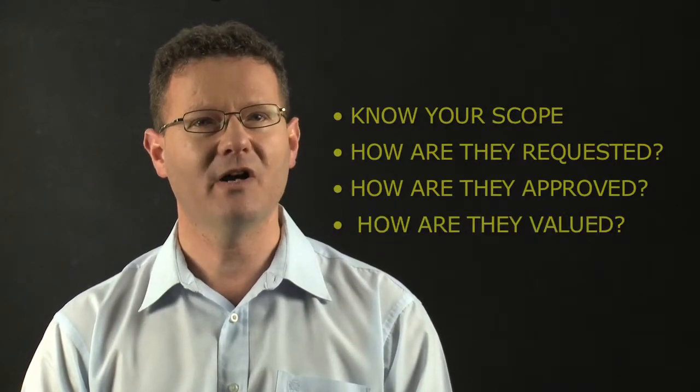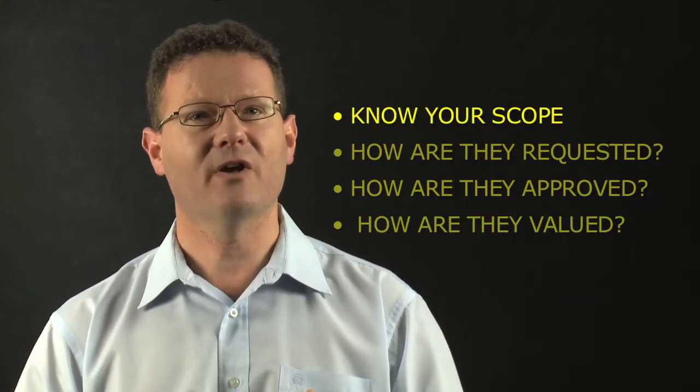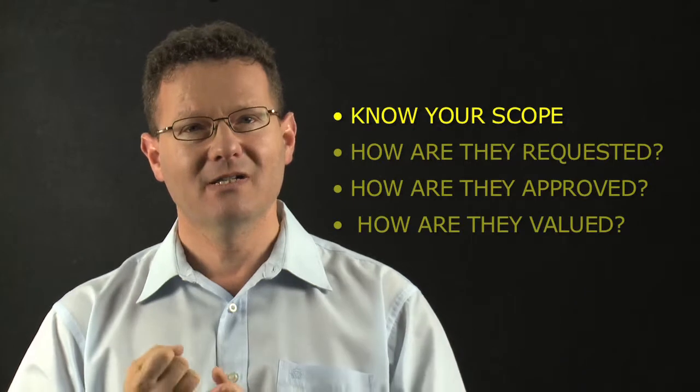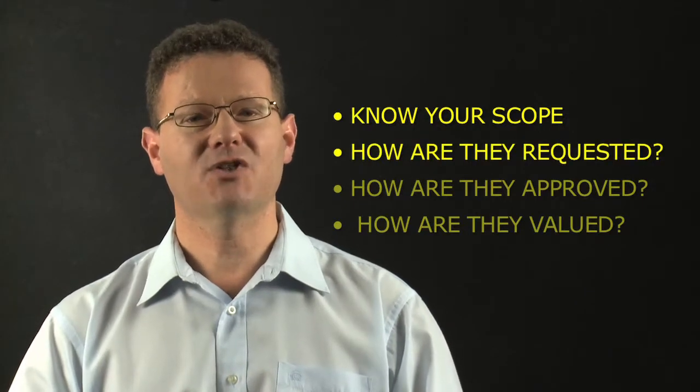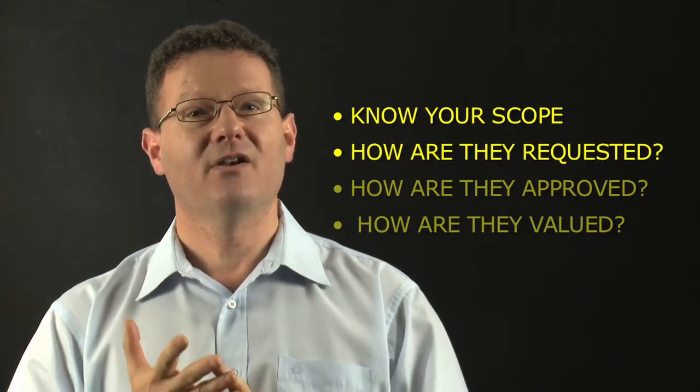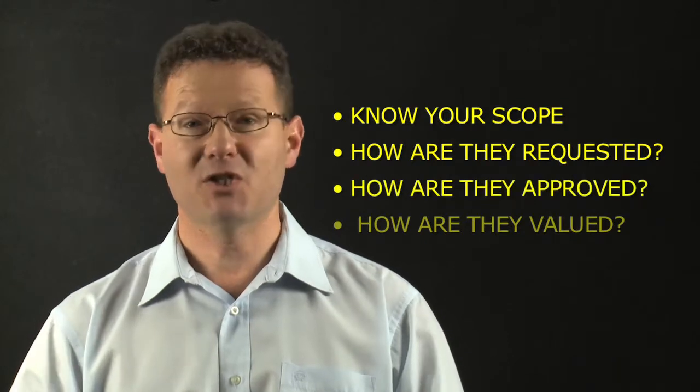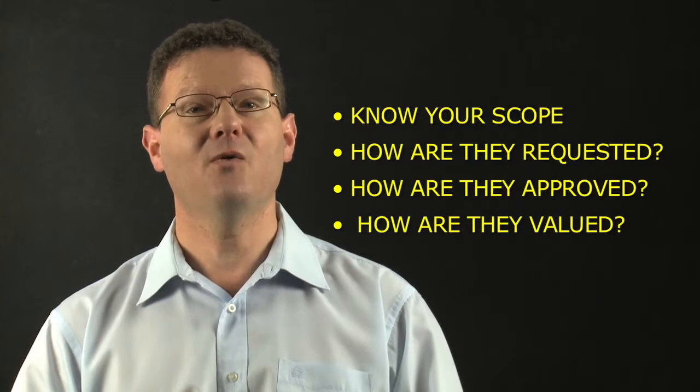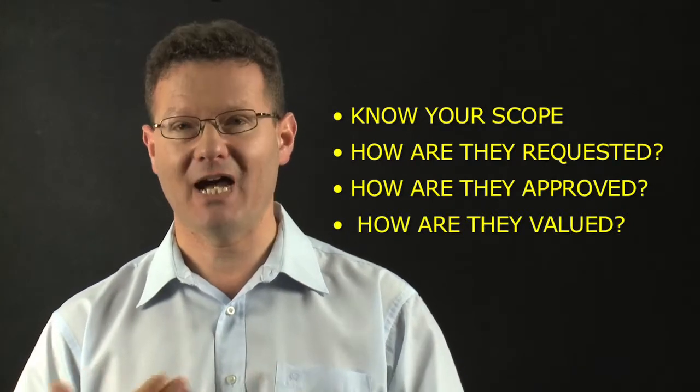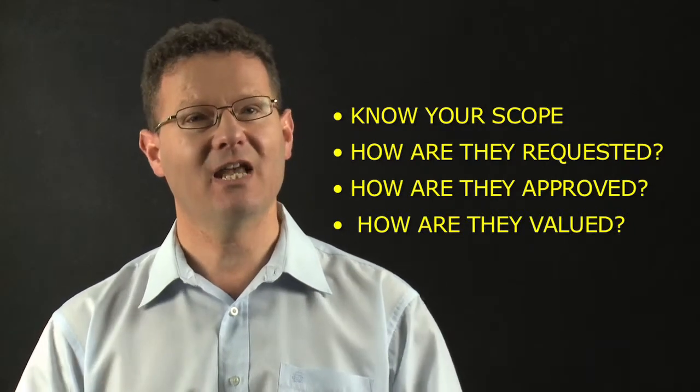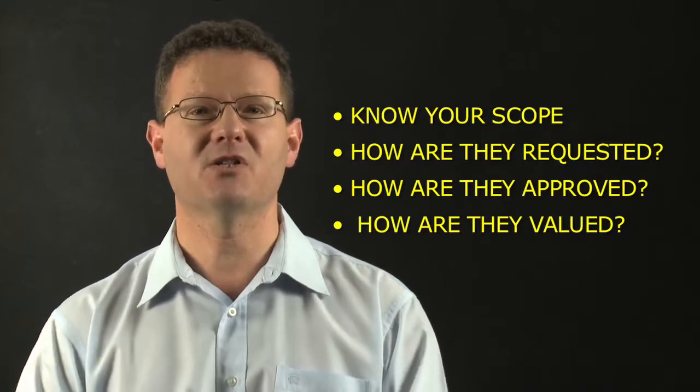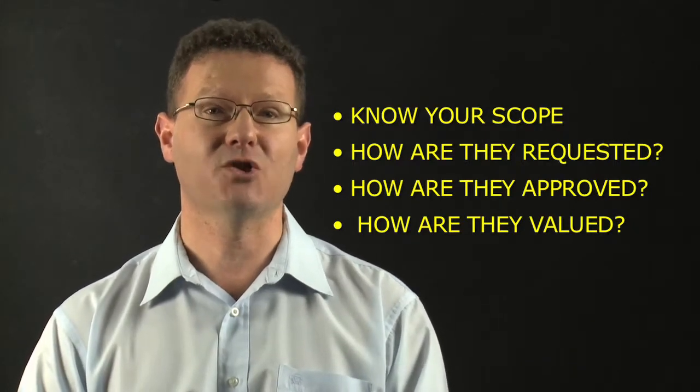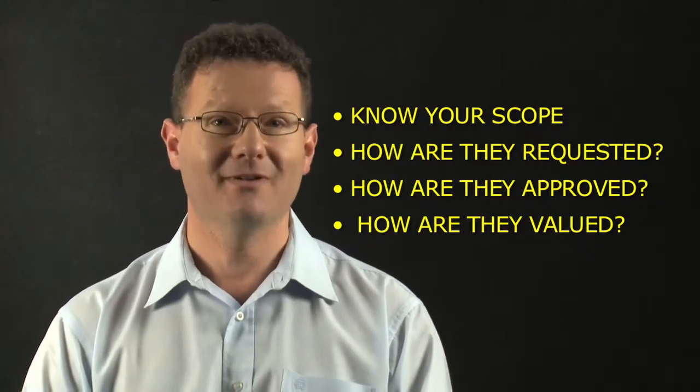So simply to summarize, know that it is a variation. So know that it is additional scope and understand your scope. Secondly, know how variations are requested. Thirdly, know how variations are approved. What is the approval process? And finally, know and agree how variations are to be valued. If you can get your head around those things and build it into your processes with your client, the arguments over variations should greatly reduce. Make it real in your business process and I'll see you next time.